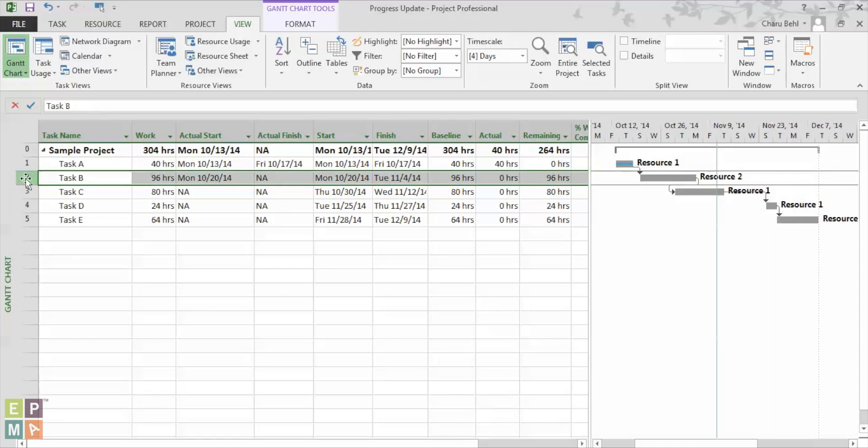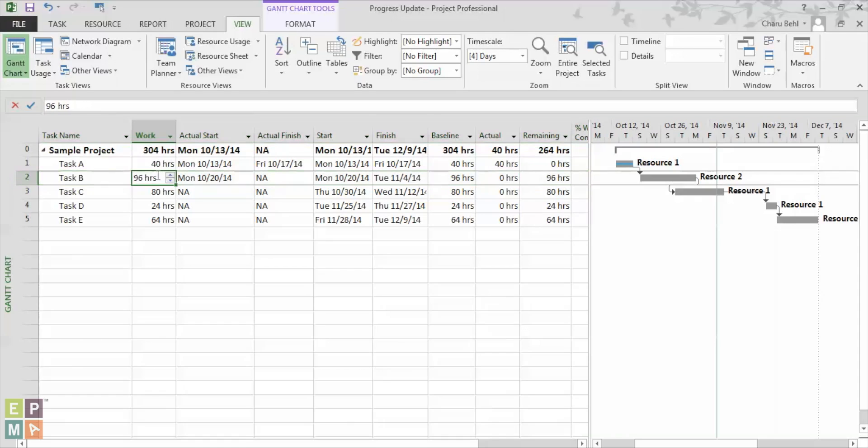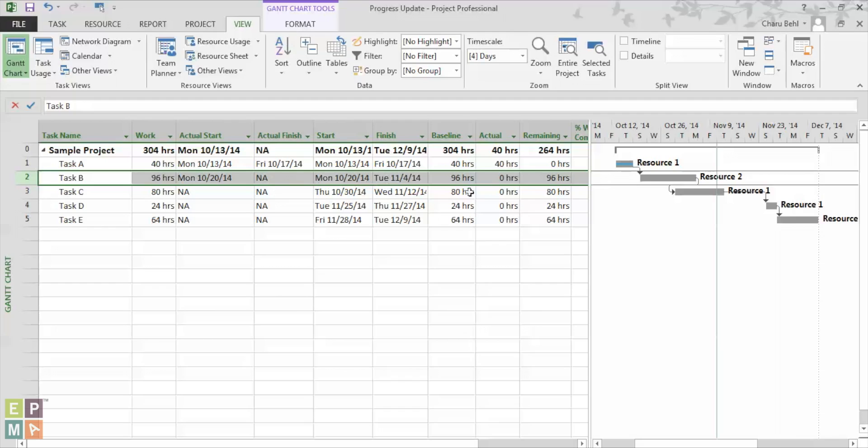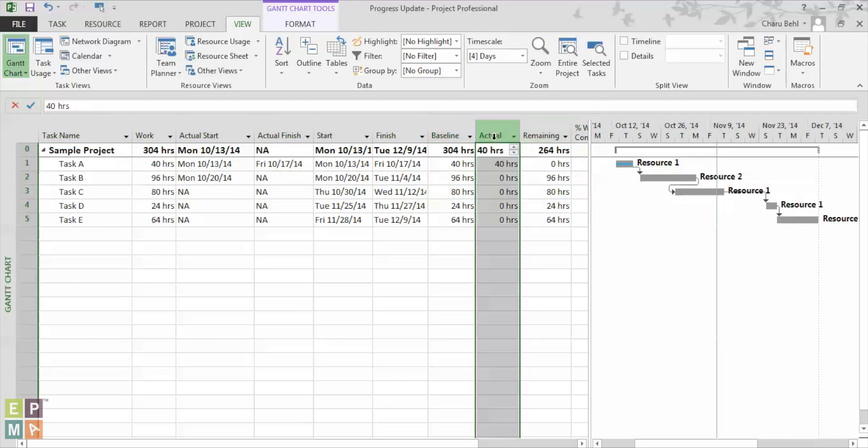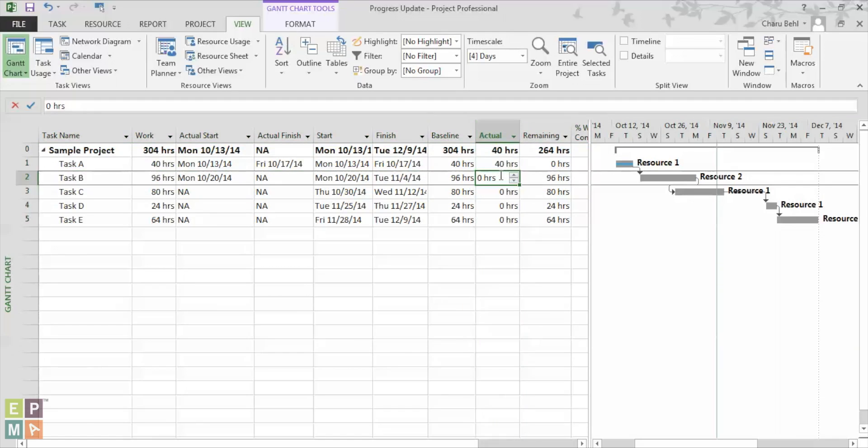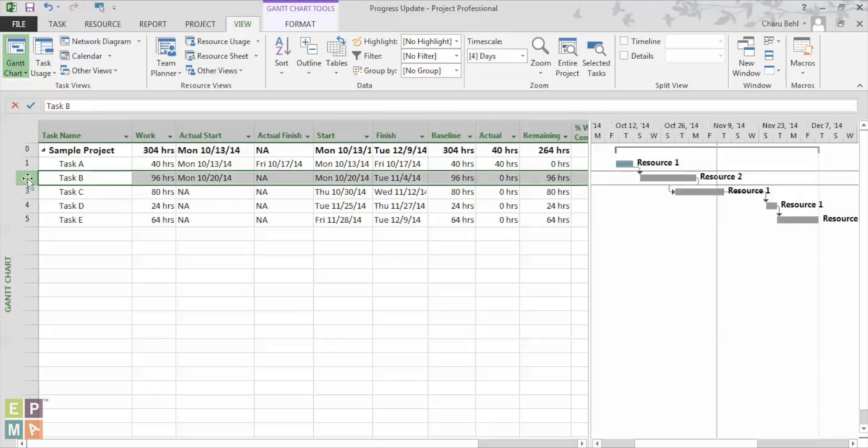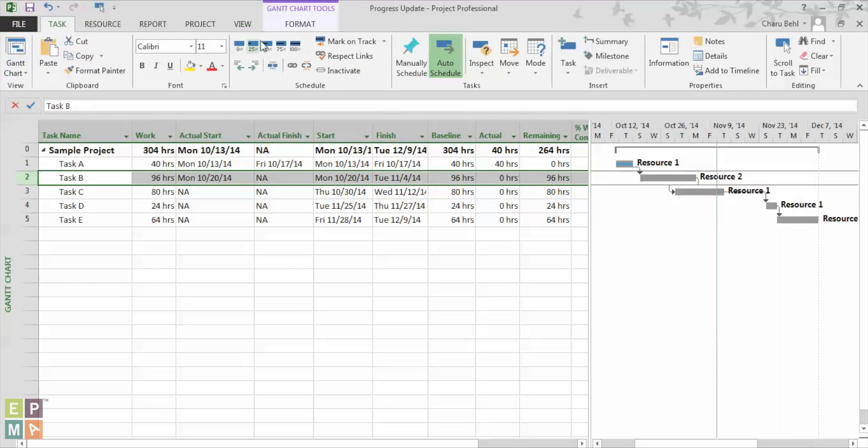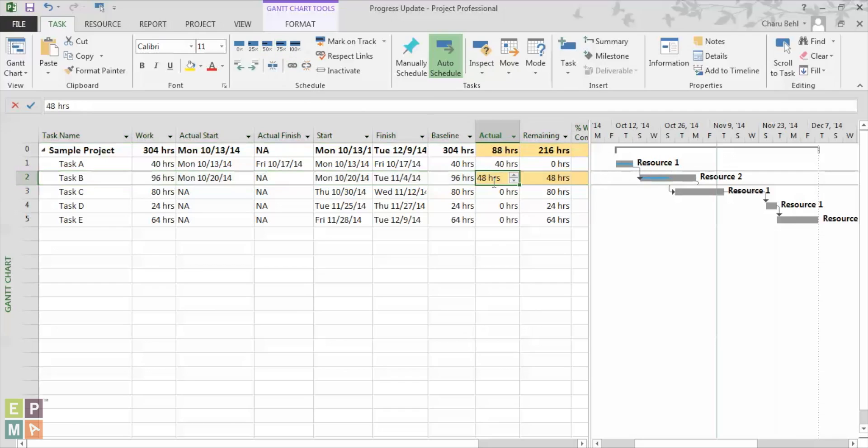Now to update task B, you see that the schedule work or the planned work was for 96 hours. And the actual work that has been done till now is 0%, that means 0 hours and remaining is 96 hours of work. Now once I mark this task as 50% complete, you see what happens. Remaining is 48 and actual is 48 as well.